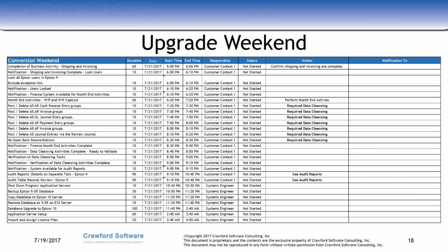The other thing that is not called out in this one is based on the timing, and there's usually one right after we import and assign the license files. As you can see, on this project the conversion was finishing somewhere about 3:40, 4 in the morning. So we put our first status meeting until the next morning. There was no reason to wake people up at 4 in the morning. We waited until 7 in the morning to have that status call. But there are also always status calls embedded in the project plan, based on where you want them to be, with the whole team coming together.